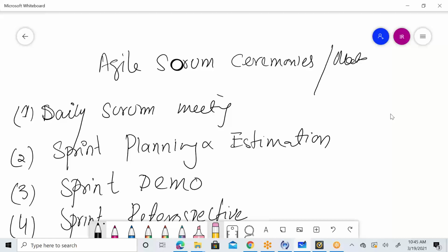But to get this process done, you have to go through the change management process and the CMT team. Approvals need to be taken. They need to understand one thing: if they want to make changes, we might need more time, we might need more resources, because we are currently working on the projects. Maybe we need one more BA or one more developer, and whether this change is feasible or not feasible, all these things are discussed. A change request ticket is created, and analysis is done by the development team and BA team. That analysis is shown back to the business users, and if everything goes well and the ticket is approved, then we can cater to those changes.